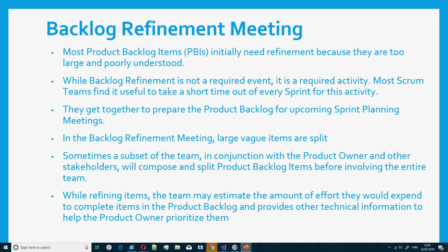And also it's important that in some cases, each member of the team would contribute to the estimate. You have people saying, oh, this particular story is a 1 for me. Another person can say, no, it is not 1, it is 5 or 7. So it's important to get story points from each member of the team, because different people will view things differently. Maybe for a developer it might be 21 because it is so big, in terms of complexity.